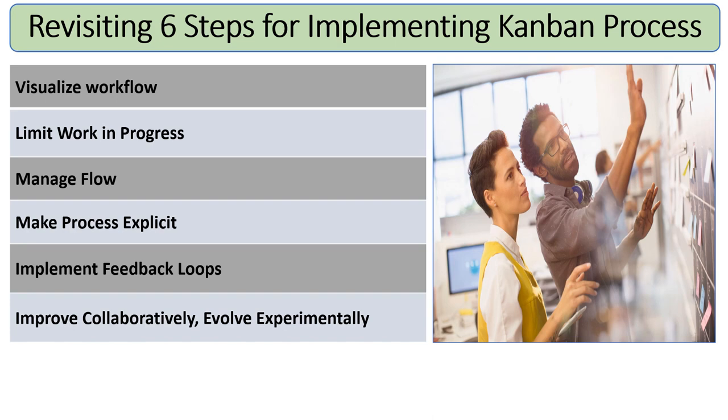And the second aspect is limiting the work in progress. That means we do not want a lot of open or incomplete items in a particular state, because that will create a bottleneck. So the idea is we try to limit the work in progress.